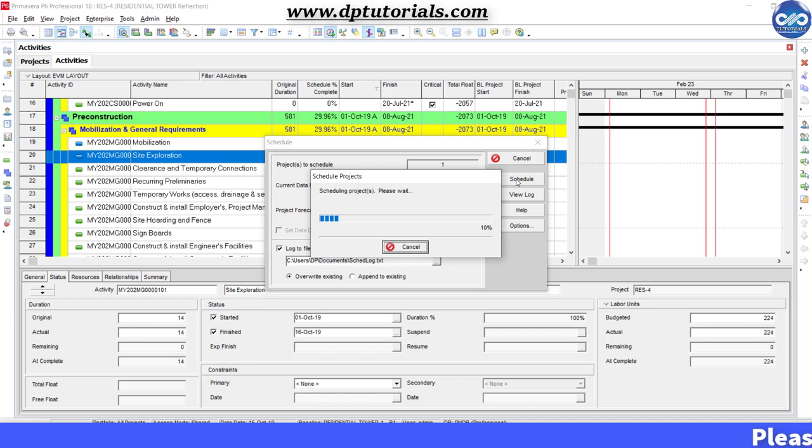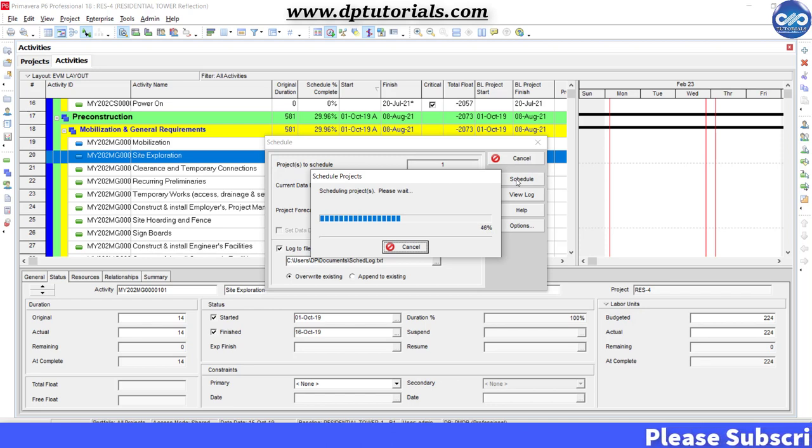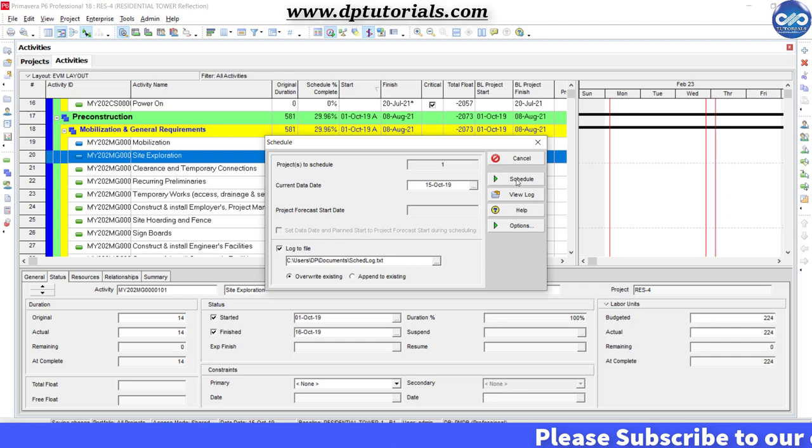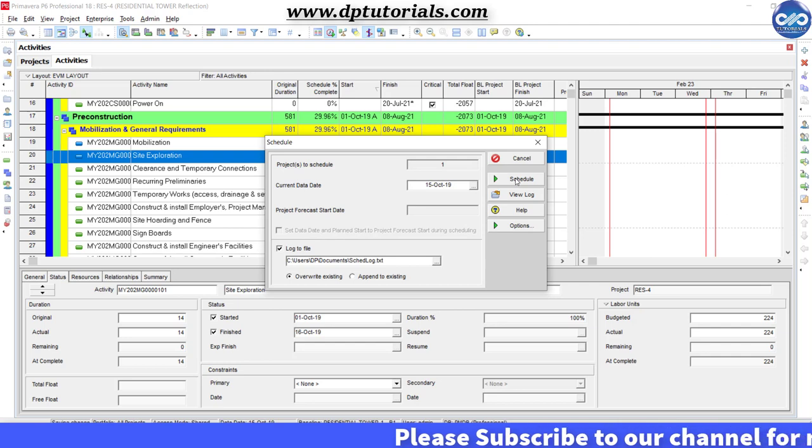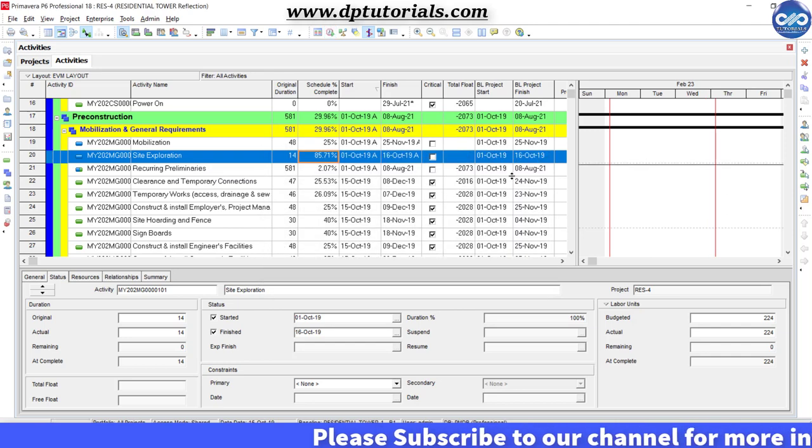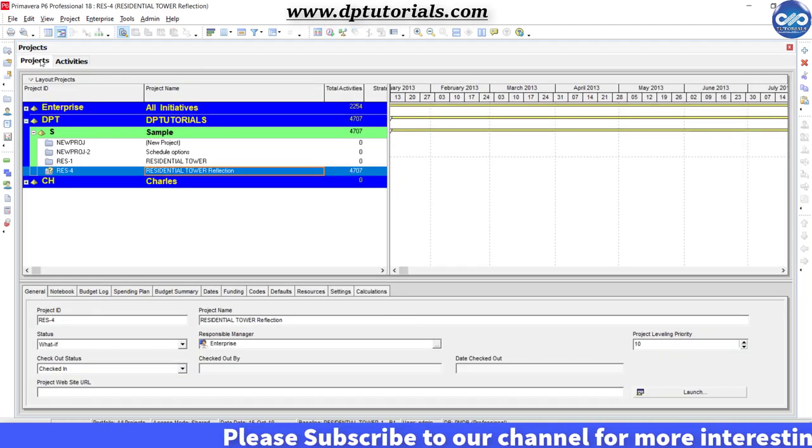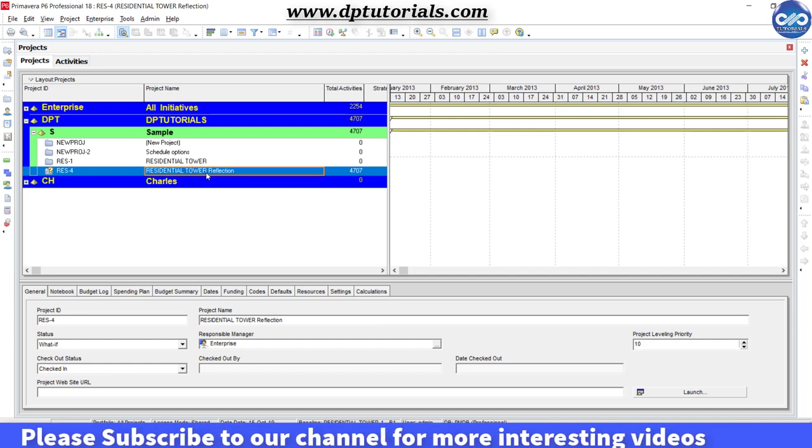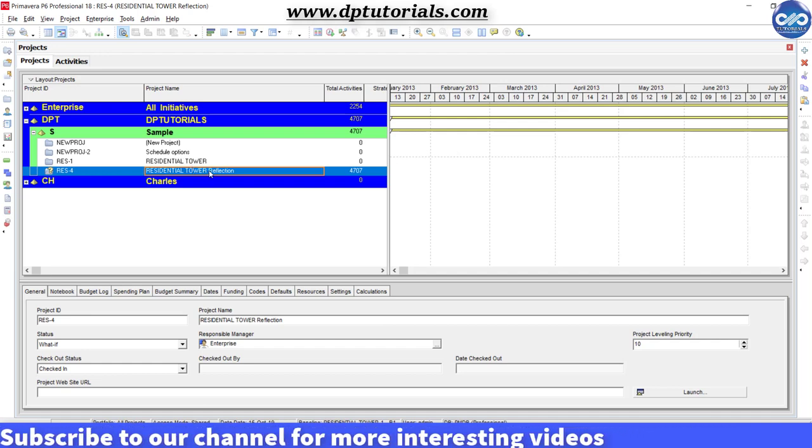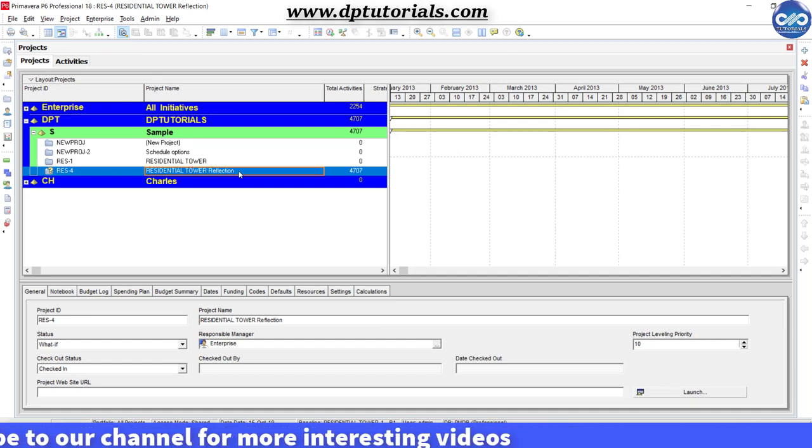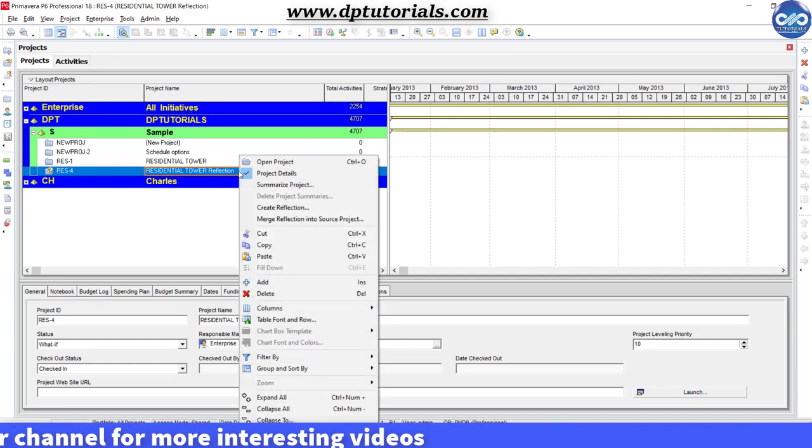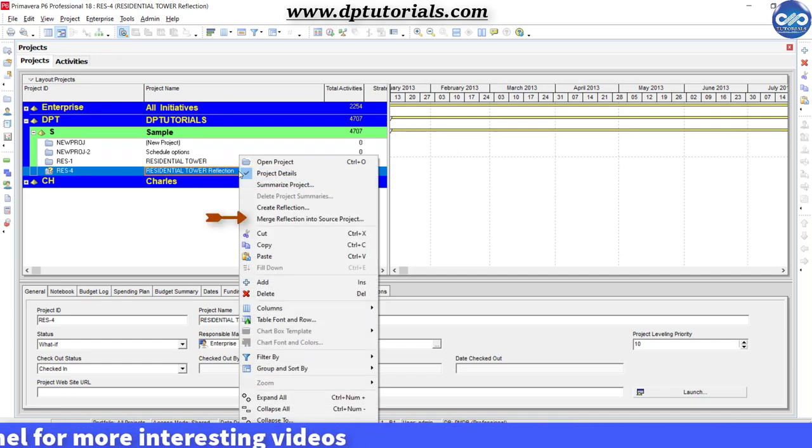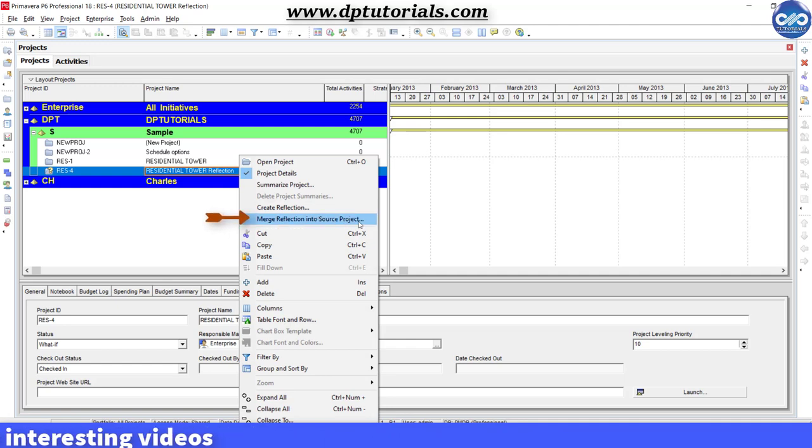So once you are done with the changes, you can merge these changes to the source project. Now go back to the projects window, right-click on the reflection copy project, and select merge reflection into source project.